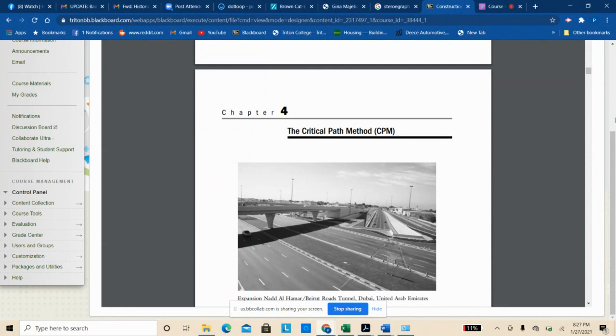So we talk about a lot of this stuff in obscure ways sometimes, and it's real academic. We're talking about nodes and arrows. When we get down to it, it is actual construction and actual tasks. It's just giving us a vocabulary to understand. When Susan told me there's a lag of 32 days, I understand what she means: there's some time frame where we may not be doing anything, but we still have to wait for that time, and that's part of our critical path.